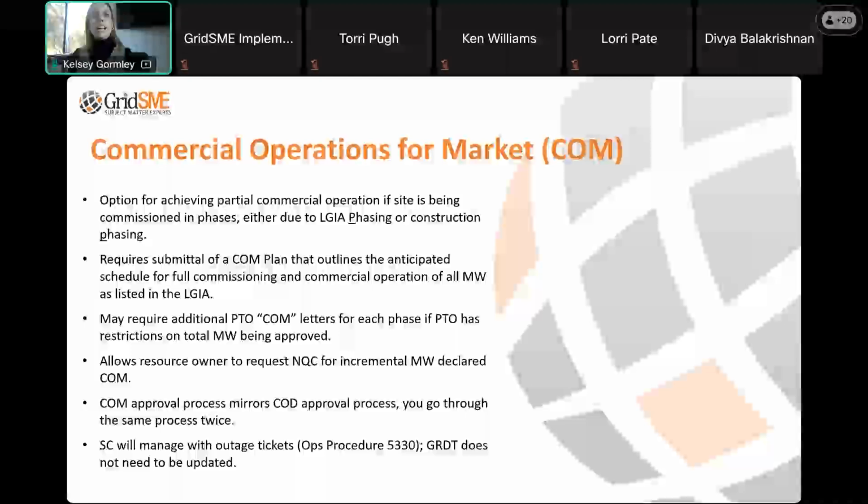So I guess I scared everybody with this, but I should probably also say if there is an outage. For example, if you're on AT&T and they have an outage in your area, and you can point to documentation from AT&T that says we have a scheduled outage happening on this circuit on this day, and it impacted our resource, you can submit that information to CAISO, and a lot of times they will just discount that period of time, because we weren't expecting them to show generation values because their whole site was under a communications blackout, right?